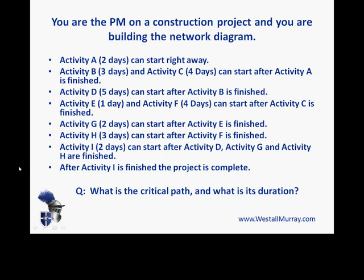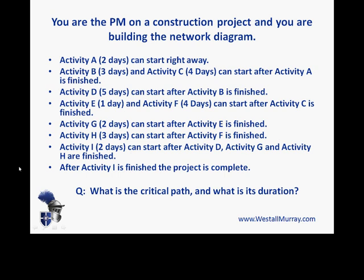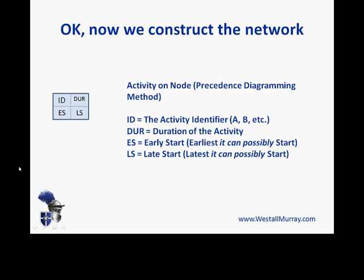The question at the bottom is a two-part question: what is the critical path, and what is its duration? To answer that, we have to construct the network. Here's an example of the boxes we'll be using for the activities. By looking at the question, you would have been able to see that this is an activity-on-node network, so we'll use the precedence diagramming method. You can spot that because the activities are listed simply by one letter — not described as Activity A to B, Activity B to C, and so on. The boxes will have the ID in the top left, the duration in the top right — both coming straight out of the question.